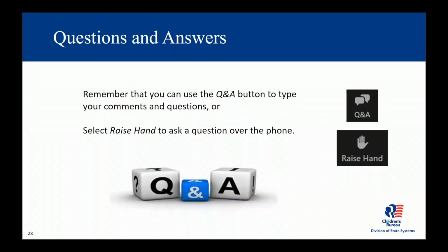So just something to keep in mind when you do contact states: if you have certain roles you're concerned about, maybe it's adoption, case management, whatever it is, set up some of those folks to talk to some of the program folks, because you really need all perspectives. And the last piece of advice is, this is another reason why it's so critical to have program staff involved in your procurement processes, both the requirements as well as the selection process, because you really need their buy-in and their understanding. And obviously child welfare is very busy right now and has terrible turnover. But I would just say it makes a real difference in terms of the ownership and understanding of what you're getting if you have that learning between IT and program. So I would encourage you to talk to other states, but also ask to speak with program folks.